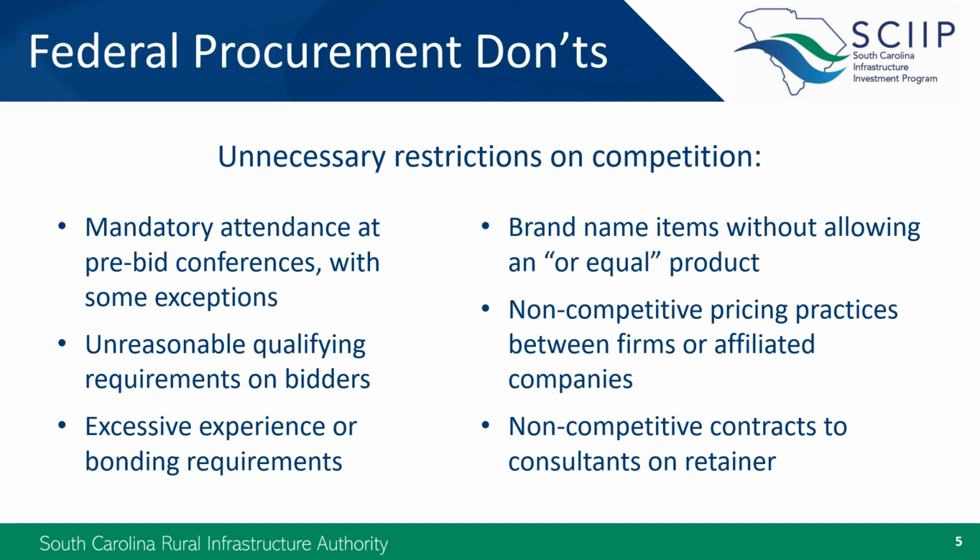And instead of requiring attendance at a pre-bid conference, you can strongly encourage it, then post a record of the discussion at the conference as an addendum to the solicitation. I should mention that mandatory pre-bid conferences may be allowed for particularly complicated projects, but you would have to submit for consideration in advance a written request with an explanation of the circumstances.